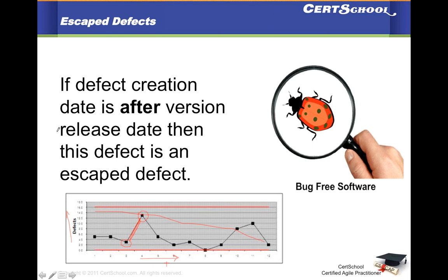There are tools within Jira that allow you to query based on the fixed version and the identified version in which that defect was identified. So you can write a query in Jira, and it'll give you a list of all the defects that were identified, and then you can objectively plot them in a graph.